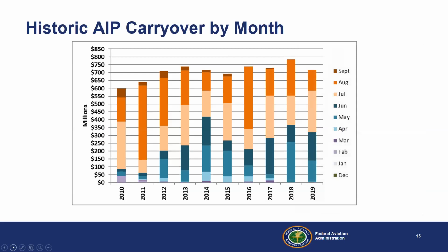Each year, we ask you to do your carryover. Now, I harp, my program managers harp, Andy Peak, our manager, harps. Everybody is carryover, carryover, carryover. If you know your community is not doing a project in federal fiscal year 2021, you need to have already communicated that to your program manager so that we can stop the slow burn of carryover by month.